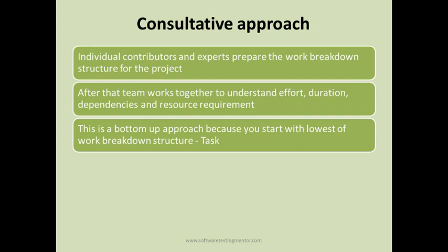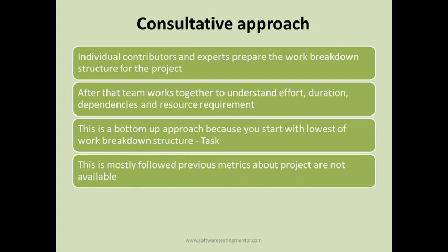Whatever effort is required to complete the tasks in the work breakdown structure is added up till the top level to get a fair idea of the complete testing effort that will be required. This is mostly followed when previous metrics about the project are not available.